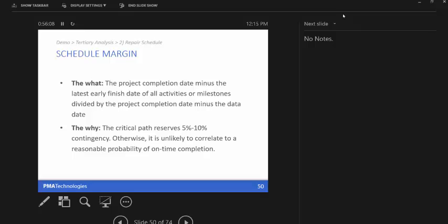When you have a critical path, you just have flow. It's a comfortable schedule. We'd all like one of those. Yeah, but how often do we get those? Well, that's why I'm curious why that's yellow. The other influence would be the level of granularity in the critical path. So if you've got fewer, longer activities, that might also be an issue that would detract from the quality of the schedule.